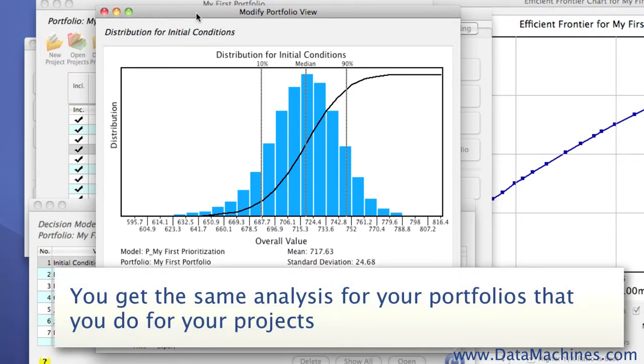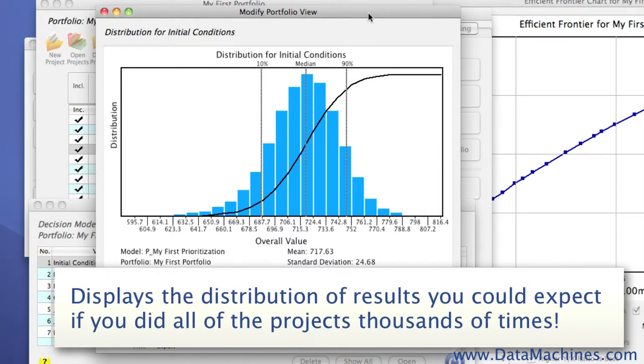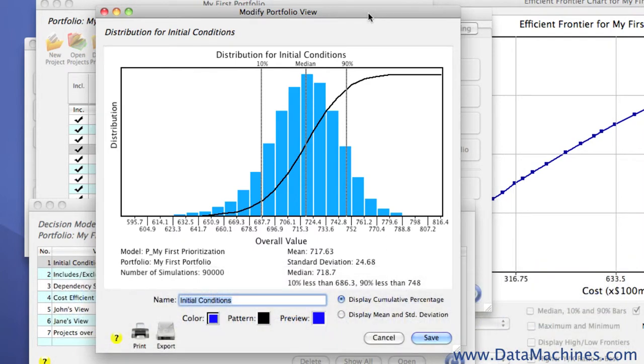That is, the Monte Carlo simulation randomly varies the outcome for each project in the portfolio, just as if you'd actually execute the portfolio thousands of times to give you a full statistical analysis of the entire selected portfolio. You can then use these to compare different portfolios graphically to select the one that's right for your business.